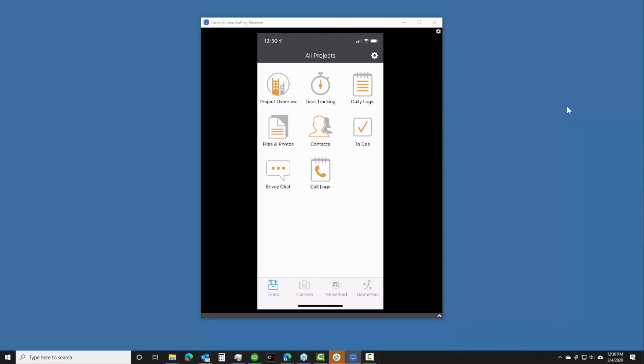With project logging, that's something that can be done by each individual user or contributor, but is also often done by a superintendent who's maybe logging what they're observing others are doing, and includes more types of information on things like general notes or delays or damages or incidents. Those are things that wouldn't normally be captured with a time clock system, but are going to be captured with the project logging. So you kind of have two different things going on there, and I really love to see people being able to take advantage of both and use the unique benefits of both.